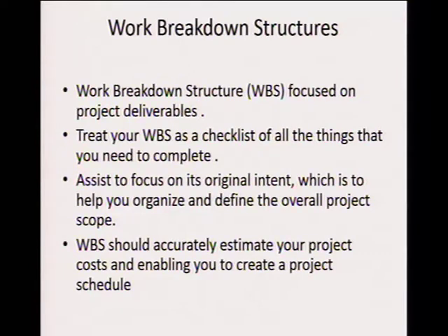The work breakdown structure, or WBS, focuses on the project deliverables, meaning what it is that is going to be done. So treat your work breakdown structure as a checklist of all the things that you need to complete. It helps you focus on the original intent, which is to help you organize and define the overall project scope. The work breakdown structure should accurately estimate your project cost and enable you to create a schedule.